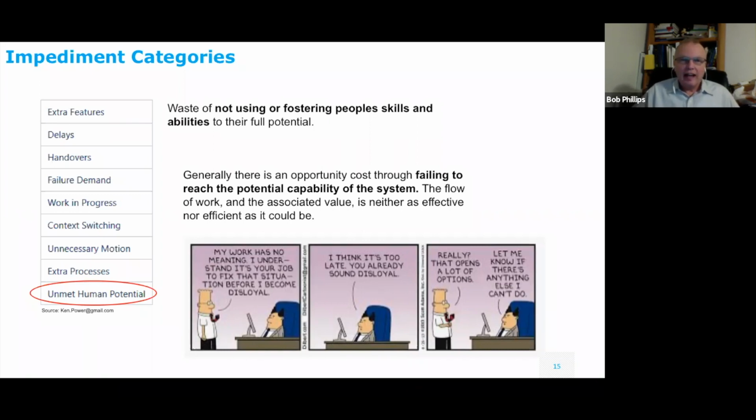But on an agile team, the product owner manages this whole extra features dimension. The product owner will be talking to your stakeholders. They'll see the outcome of a sprint, and then the stakeholders say, well, I'd really rather see it do this instead of where we're going. Then the product owner goes to the dev team and says, hey guys, this is what we want. The dev team gives an estimate and says, to do that, it's going to cost you this many points. And then you can translate that into time based on the team's velocity.